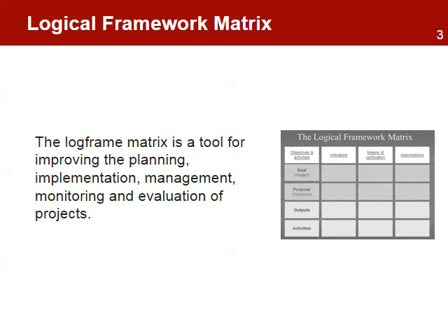The Logical Framework Matrix, or LFM, is a tool for improving the planning, implementation, management, monitoring, and evaluation of the project. It is a way of structuring the main elements in a project and highlighting the logical linkages between them. The Logical Framework Matrix is the main output of the entire project analysis phase and summarizes the results of all preceding steps in a condensed form. The matrix provides a summary of the preferred approach from the objective tree. The matrix outlines the logic of the results chain: the impact, outcomes, outputs, and activities of the project.